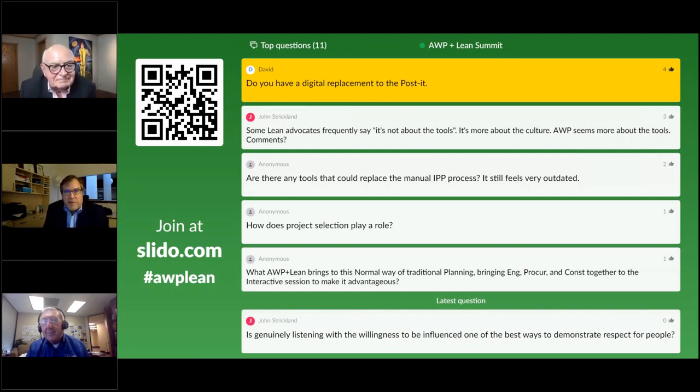Dan and I were at a hospital here in California together recently, and we were using vPlanner. One of the things you're saying, John, absolutely makes sense. The specialist there would collect the changes that the teams made every day and put them up on this board wall, and the teams would come up and see where they were, add new stickies, all sorts of things. We capture that, and the next day they would have updated information. Because if you don't give them something that's relevant, you're right, no one's going to look at that screen. It's too tedious, doesn't make sense. But if you get that big wall and give them current information, it matters.